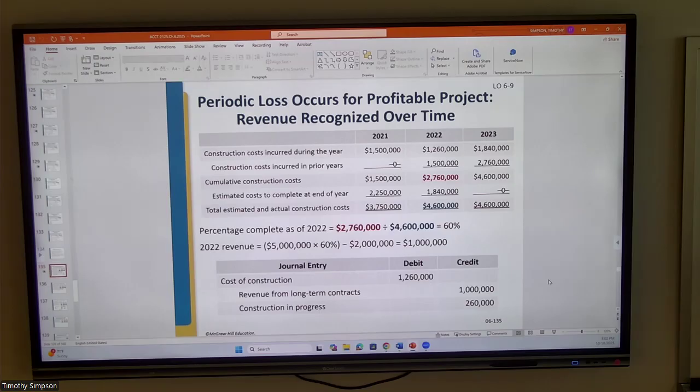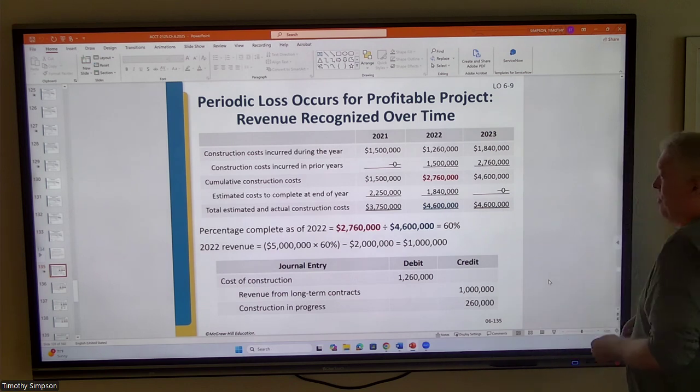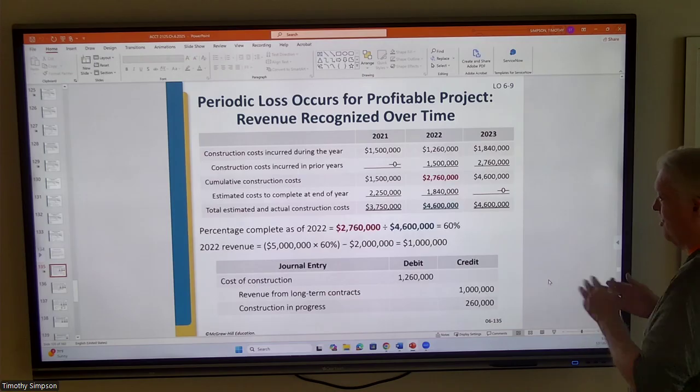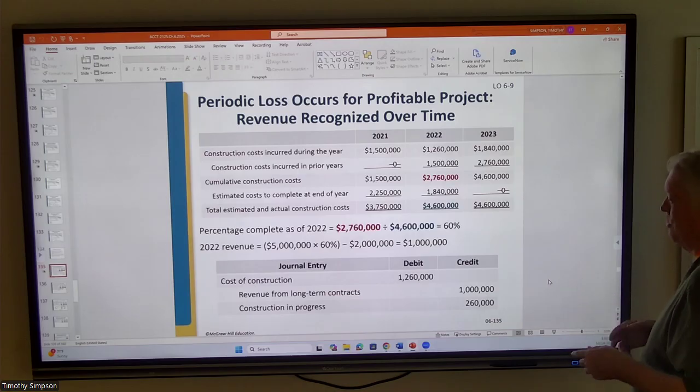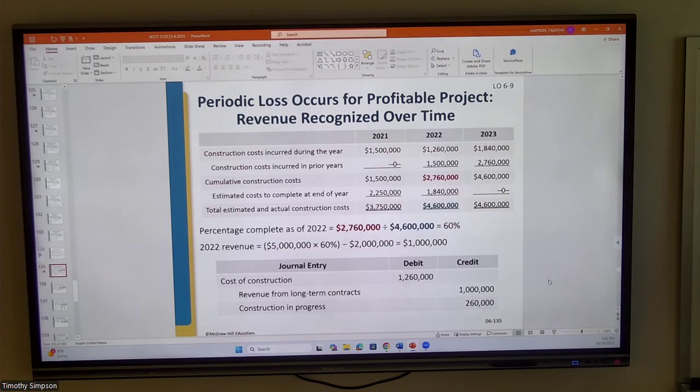The contract price is still $5 million, but it looks like we have an increase in cost from $4.1 million, which was the initial projection, to $4.6 million. And so as a result, now everything changes, and you've got a different percentage of completion based upon this cost-to-cost measure. So as a result, we are going to be slowing down our earning of profit and our earning of revenue, for that matter, based upon these cost overruns, or whatever you want to call them.